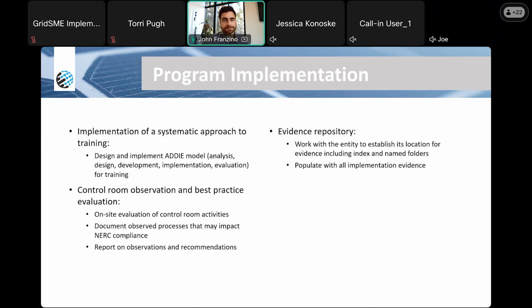So with all of these requirements, some of the things we explicitly talked about, like doing training before registration occurs, that's really there to set your day one compliance posture, right? So you want to make sure prior to going through the registration process that your ducks are in a row. And that means generating evidence for all applicable requirements.